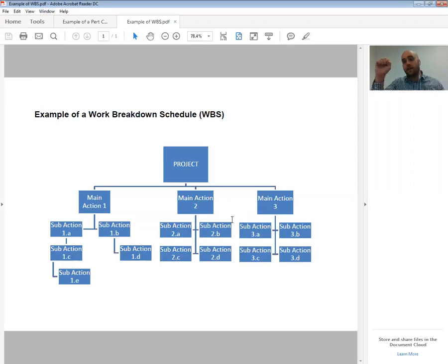So the clear garden bed task might have a few sections. It might be removal of dirt and relocation of other plants. So you've really broken it down then, and you want to keep going until each one of these is a separate task that you could allocate to a person. You could keep going and breaking it down, breaking it down, breaking it down. We don't want you to go that far, but do try and break it down to the point of one job. So that one job then would be relocation of plants. So someone's job is to remove the plants, which is in itself part of the bigger task. That's what you need to do here.